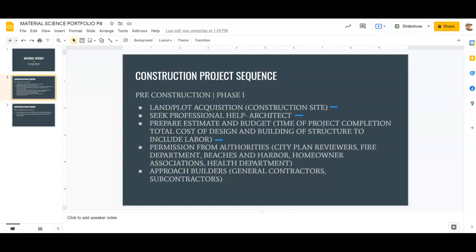Sometimes you need to go to the beaches and harbor department to ensure you're not building too close to the water, or building something that could potentially fail and end up in the beach or harbor. They want to make sure everything is done safely and isn't going to harm marine life. You might have to submit a set of plans to them as well.